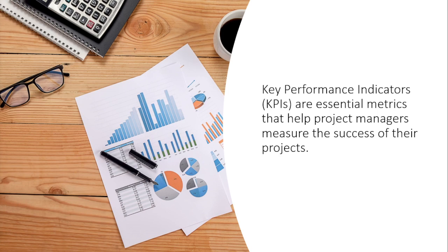There's also one other definition I want you to be aware of, and that is the Hawthorne effect. The Hawthorne effect states that the very act of measuring something influences behavior. So be careful. Take care. What are you measuring? Some people are measuring the amount of defects found by the team. Let's reward them based on the amount of defects. Well, think about it. If your developers and testers are in cahoots with each other, well, they're going to be planting some bugs. And guess what the testers are going to do? They're going to be reporting many bugs found so they can get those rewards. True story from a buddy, Roy. So be careful what you're measuring.